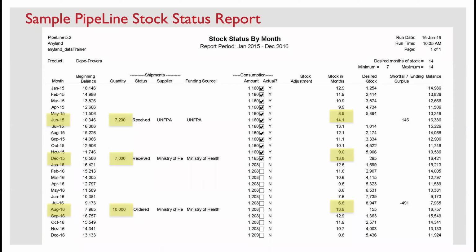If the shipment is very late, we could be at risk of a stock out, either at the central level or even throughout the country, depending how late that shipment is. And of course, we want to avoid either of these happening. So to avoid this risk of any stock out, the element that we will monitor now is lead time.